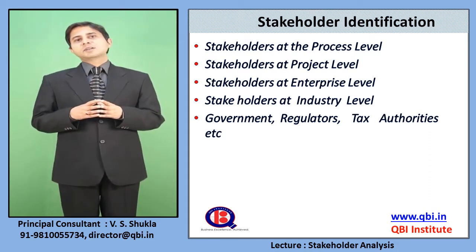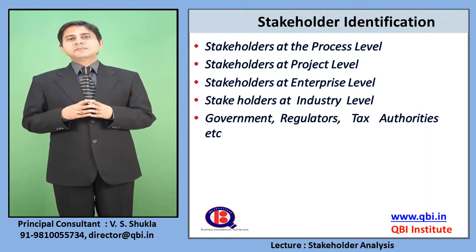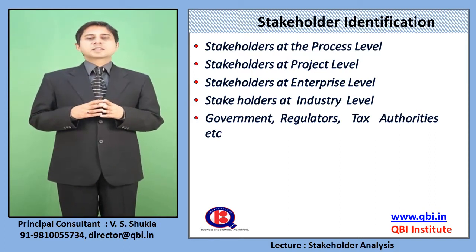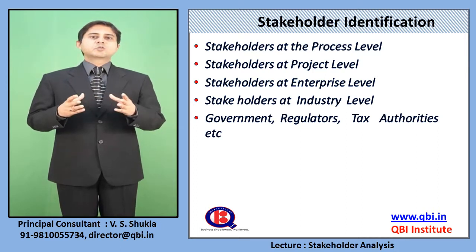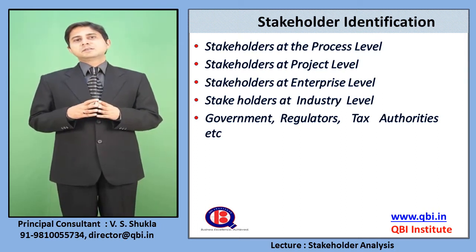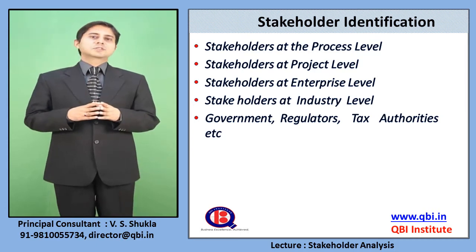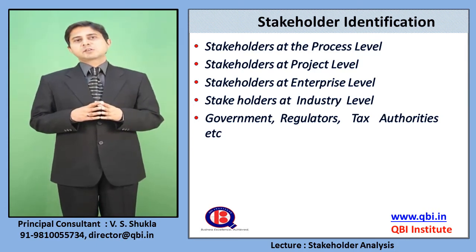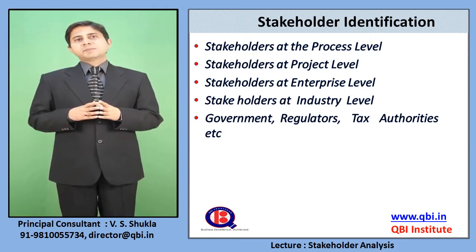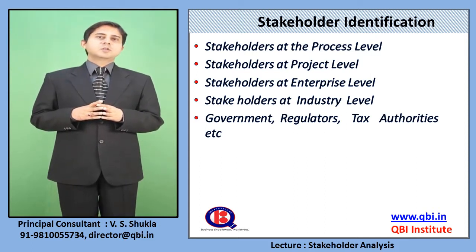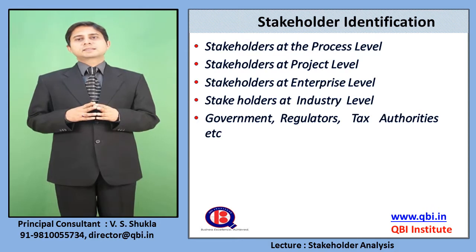Then there are stakeholders at the industry level. Even your competitors are your stakeholders, or maybe suppliers who are supplying some information or some service, or whose solution has an interface with your solution, is a stakeholder. Then there are government regulators and tax authorities who are stakeholders to the project.